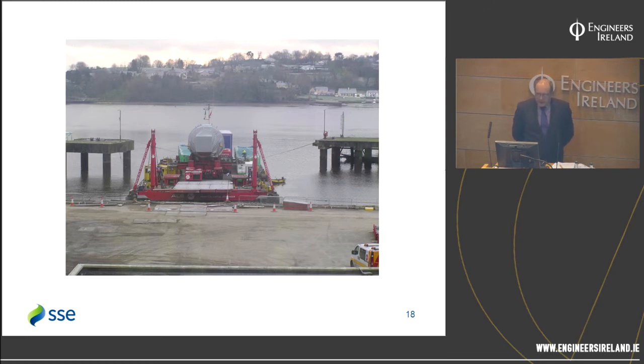And what you don't see there is the steel bridge that connects the dolphin and the main body of the jetty. That's already been removed, and we removed it by unbolting it at both ends, placing a barge underneath it, and then lifting it off on the rising tide, where the bridge was lifted onto trestles, and then brought by barge back down to the port of New Ross. It was stored there, and it was reinstated at the end of the barging process.